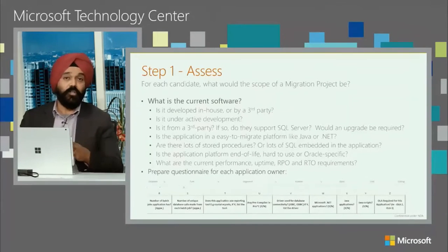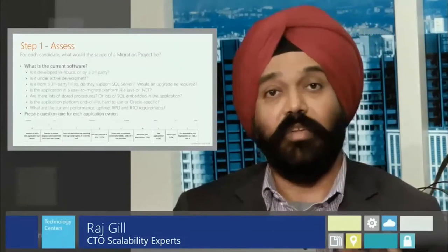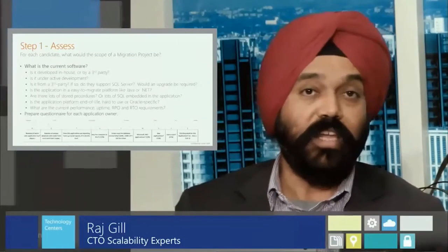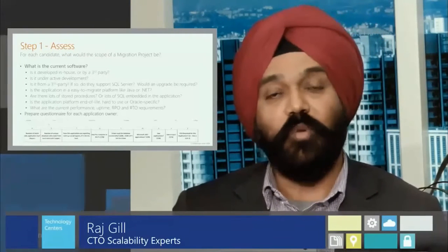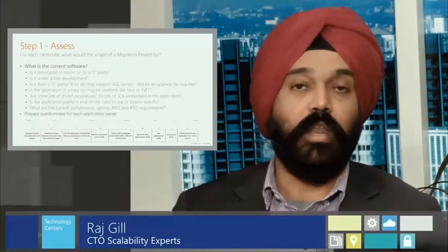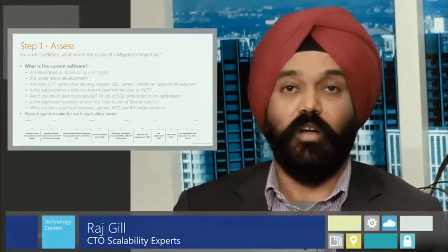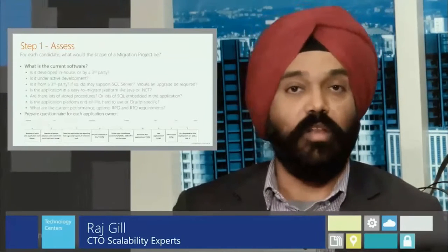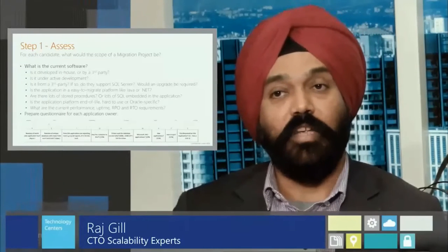Now, on top of that Oracle, you have your applications, which bring their own complexities. For example, you may have third-party applications, vendor apps that you have heavily customized. You may also have in-house applications where you have legacy code. Some of the documentation on the code may not be available. So what's important in the assessment step is to make sure that we look at an inventory of all of the Oracle databases, what versions they are, what is the type of implementation of Oracle, and all the application and middle layer components so that we can really prepare our next steps for migration.